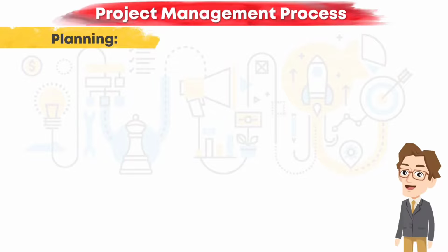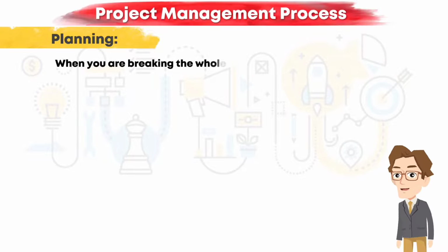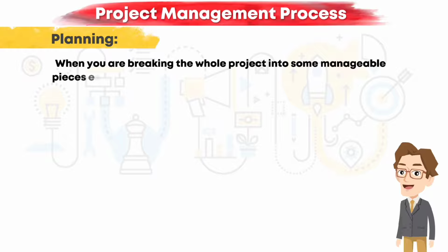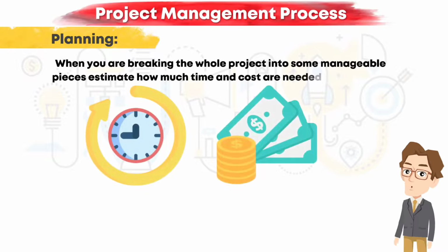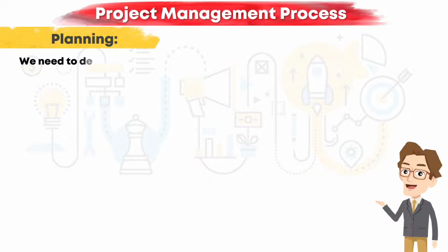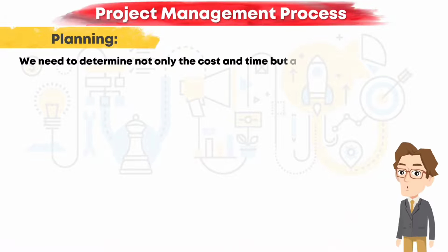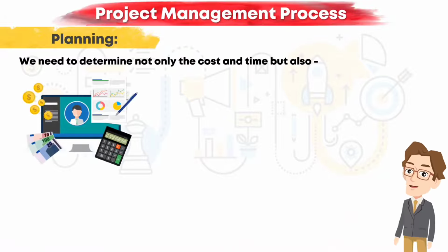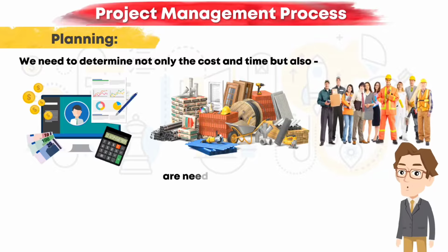Keep an important thing in mind. When you are breaking the whole project into some manageable pieces, estimate how much time and cost are needed in each step. So, you have a rough idea about how much cost and time are needed to complete the whole project. We need to determine not only the cost and time, but also how many resources, materials, and manpower are needed at each step.